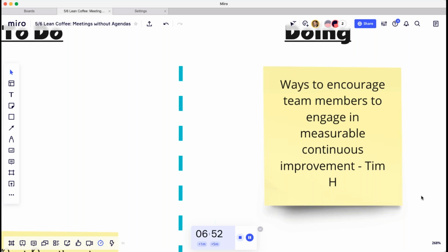What I've seen work with the last team that I led was we did a DevOps heat map that sort of listed out a lot of the fragilities, right, in places where things were manual and automated, and we would do sessions to refine it, and we would color code it. You give the most critical things a red, like this is a manual process that takes this many hours every week or every month. And if someone's manually doing this file and they forget to put a colon at the end of this, then this process fails and our customers are mad. That would get a red, right?